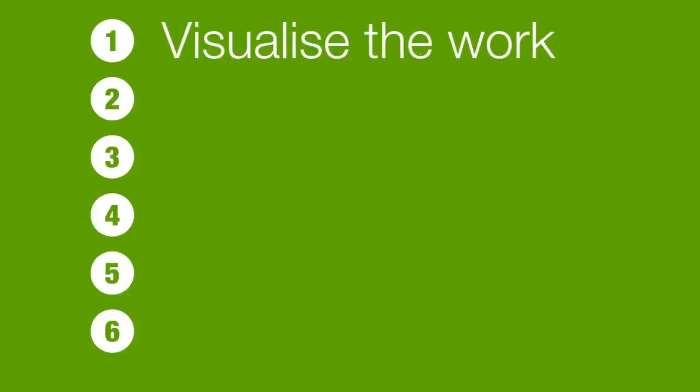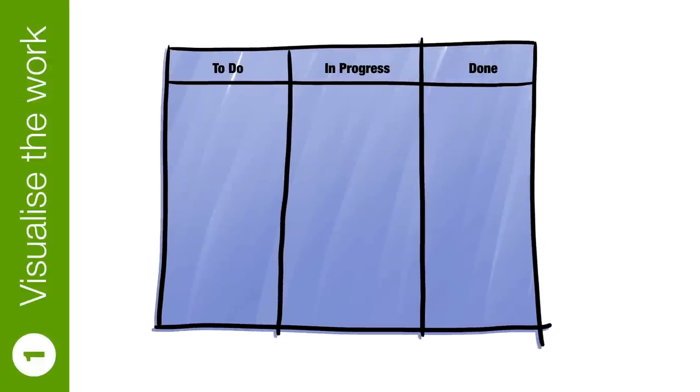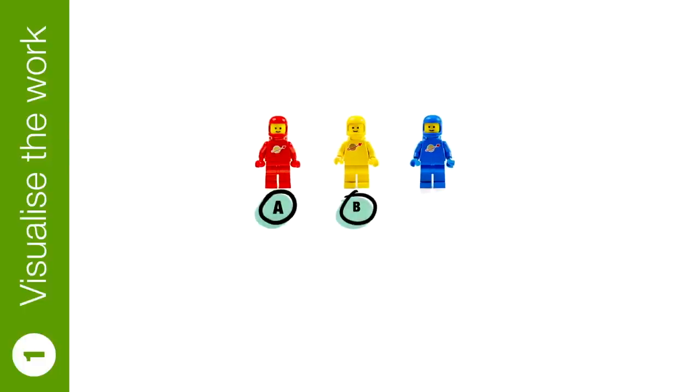Step one: visualize the work. If you're like most Scrum teams you probably already have a board — and the board is just one of the things that Scrum doesn't mandate. In Kanban, though, a board is mandatory. It's one of the key tenets of Kanban that we must visualize our work. So if you have a board, even one as simple as this, then you've already taken your first step towards Scrumban. I'm going to ask the team to take themselves off for a super quick sprint planning session — and I do mean super quick.